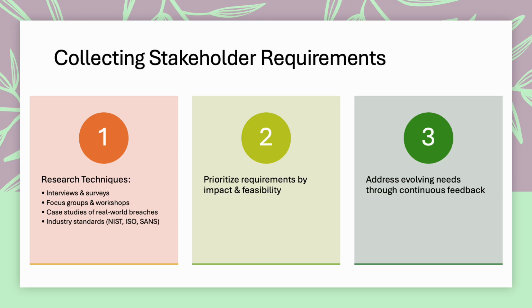One of the most effective research techniques is conducting interviews and surveys with key stakeholders. For executives, interviews can focus on strategic goals, risk reduction, and compliance requirements. For employees, surveys can assess their baseline cybersecurity knowledge, perception of current training, and preference for a learning format.